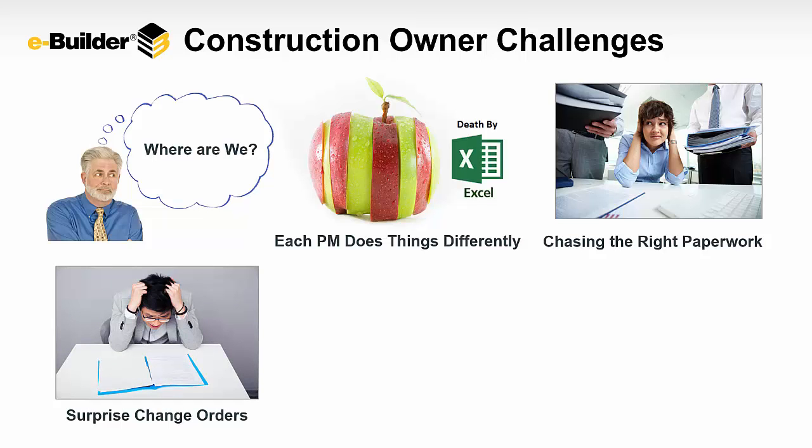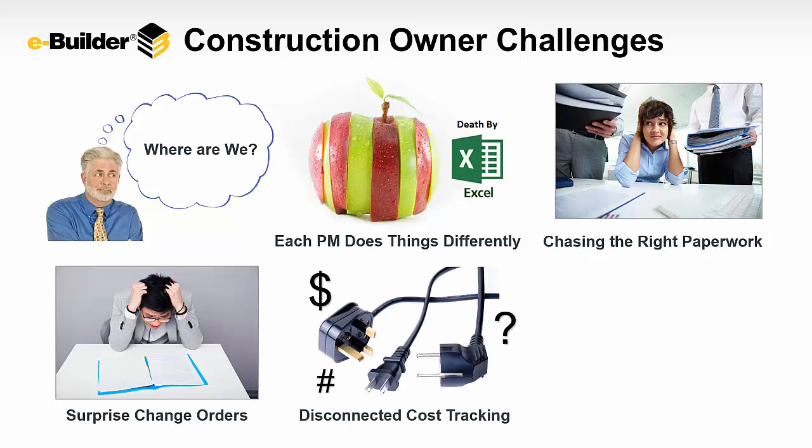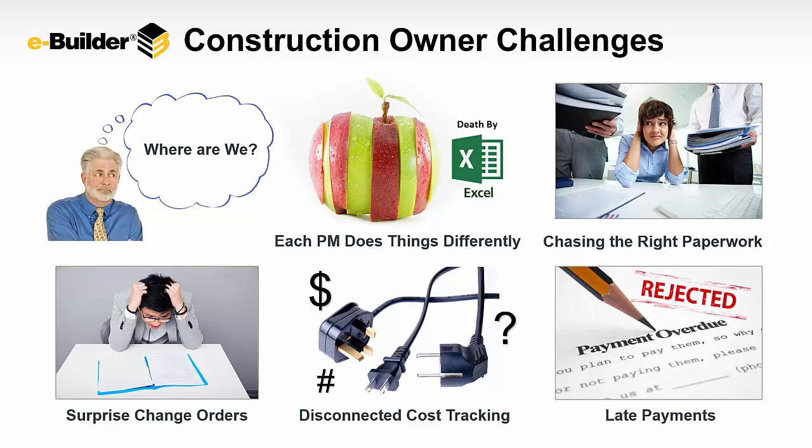And then also what you'll hear is that project managers get a long laundry list of change orders that will come up late in the construction process and late in the project life cycle. The project manager didn't have funding readily available or put together in his forecast for that. He then has to go to finance and say, hey, I need some extra money here that I wasn't really anticipating. And then things may get compressed, and errors and mistakes may happen in doing save as on Word documents, and it gets rejected by finance, et cetera, et cetera.